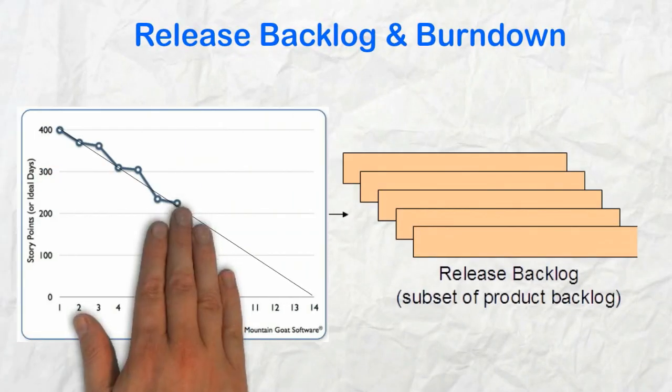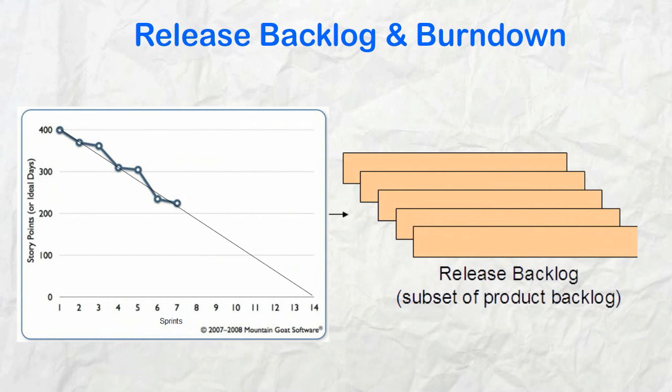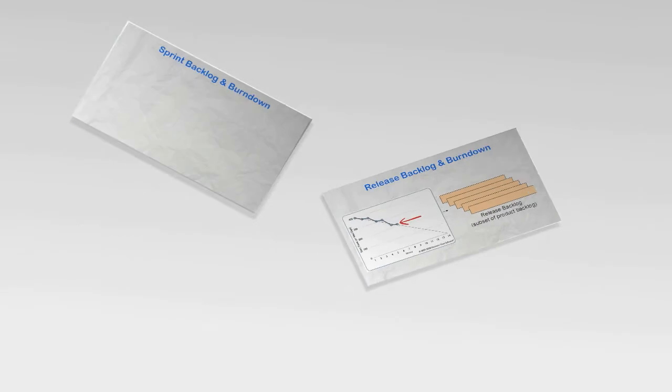The release burndown is a common method of monitoring progress towards the release of a product. It shows the number of story points and sprints remaining till launch. Simply put, the burndown makes it easy to see if a project is on track, since a line or chart tracks progress, and if all is on track, the line will be on or very close to its diagonal guideline.